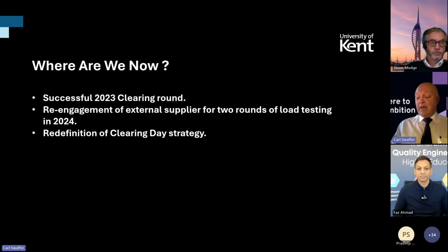Historically, for many years, we have implemented a change control period during August with a complete change freeze around the A-level results download and start of clearing. But the major incident and resulting actions have also highlighted and reinforced the continued importance of this risk-averse approach, with exemption requests for system work coming under very close scrutiny from the Change Advisory Board during this period.